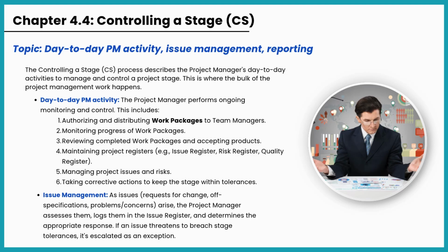Issue management: when any issues arise, like requests for change, off specifications, or concerns, the project manager logs them in the issue register, assesses their impact, and decides what action to take. If an issue might exceed tolerances, it's escalated as an exception.